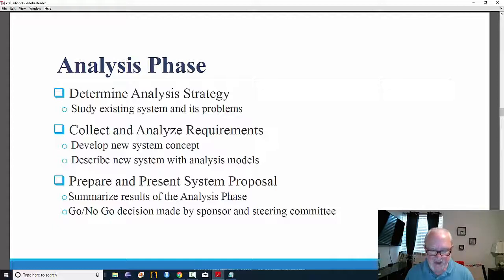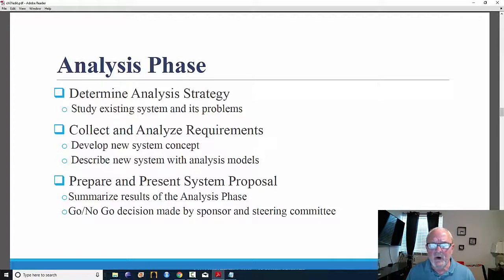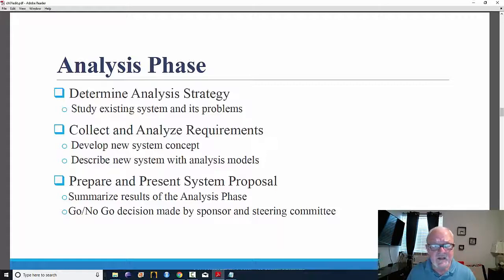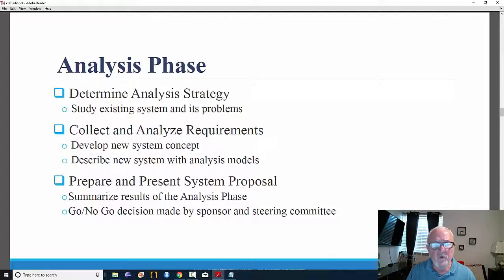Phase two is the analysis phase. Key questions include: who will build it, what will be built, where will it be built, and when will it be used? But really, the key element of the analysis phase is requirements — the business and technical requirements that must be addressed, and what this information system will do. The steps typically involved are to determine an analysis strategy, collect and analyze requirements, and prepare and present a system proposal. The first step — determining analysis strategy — addresses whether you are redoing an existing system or building an entirely new one.